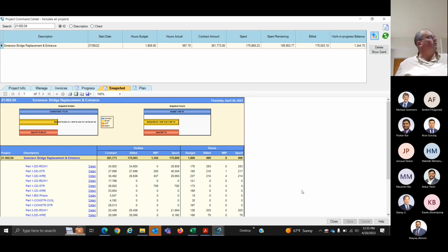I might be jumping ahead, but I just take my calculator, the spent from the contract, to find out what is remaining. I move the decimal point over 2 places to the left and divide by 2. That's how many hours you have left.